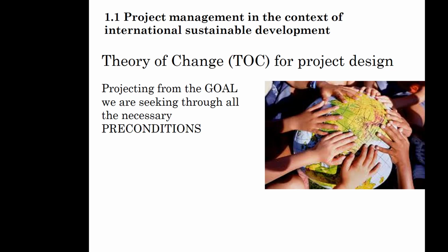So there will be a graphical representation of all these changes to articulate and to test the causal linkages between all these results. At the end, we will also have a hierarchy of objectives like outputs, outcome, goals, but based on a much more sound background that explains the change that we want to achieve, supported by elaborations on the assumptions, on rationales, and also on a framework of indicators for monitoring and evaluating the project achievements.